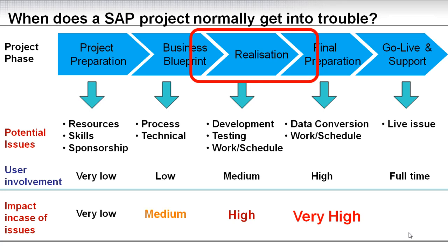And again, to stress this in the red box here, normally the project gets into real trouble when they get to the sign-off of the business blueprint, during the realization, and when they start the data conversion activities in final preparation.